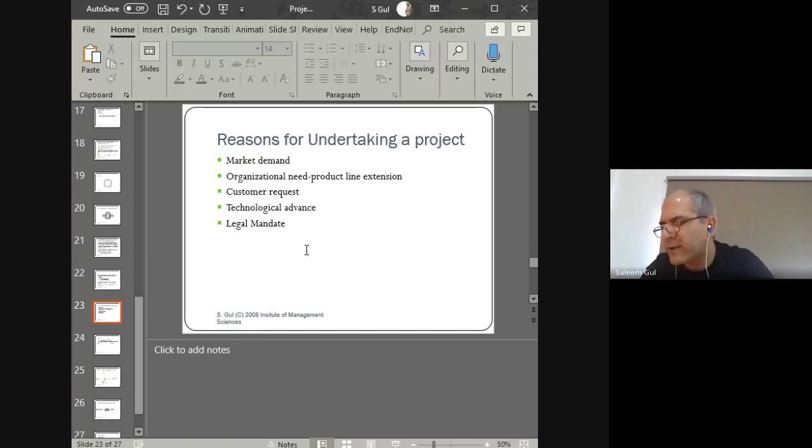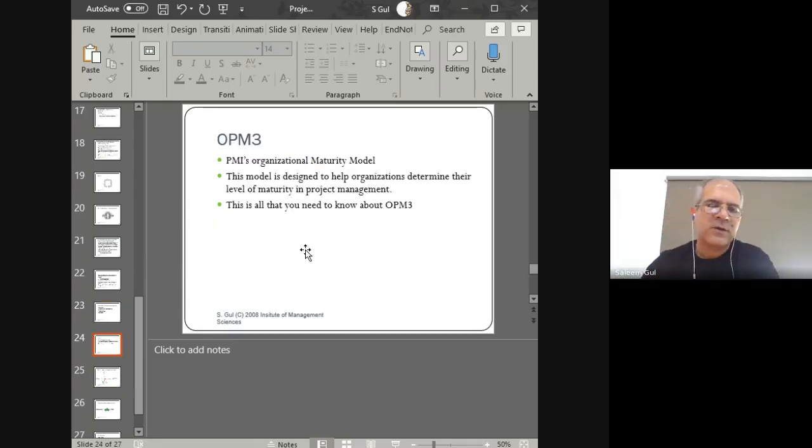And if the legal requirement has changed again, you may not have to conduct the project further. So the idea is that you revisit the reason why you started the project again and again and again at every point where a particular phase of the life cycle comes to the conclusion. And if the reason doesn't exist anymore, you don't continue the project anymore.